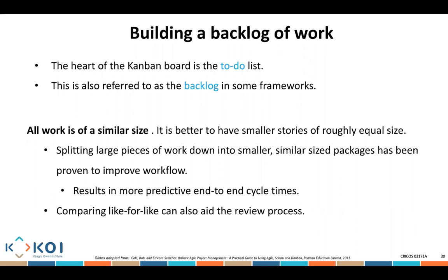If there's a large piece of work, we split it into smaller packages that you can incorporate and use as part of your workflow. When you create smaller chunks, it is easier to predict what outcomes you would like, predict how long the cycle is going to take, and predict the start and end times of all of these cycles.